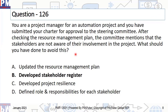The correct answer is 'develop stakeholder register.' So what should have been done to avoid this? Basically, the committee mentions that the stakeholders are not aware of their involvement. This is not because of your communication plan, not because of the resource management plan, and has nothing to do with project resilience. This has something to do with risk management. Certain stakeholders are not aware that certain things are happening in a project — they've either not been identified or not been prioritized properly. Basically, they don't show up on the risk register, or even if they do, they are not a high priority. So you need to develop or redo your stakeholder register, and that alone will take care of the problem.